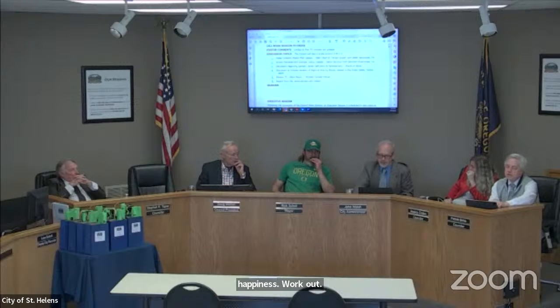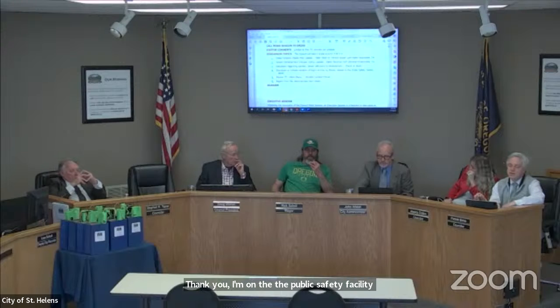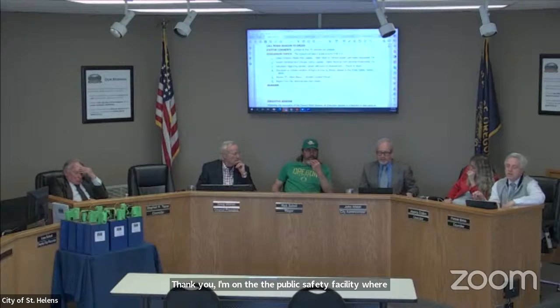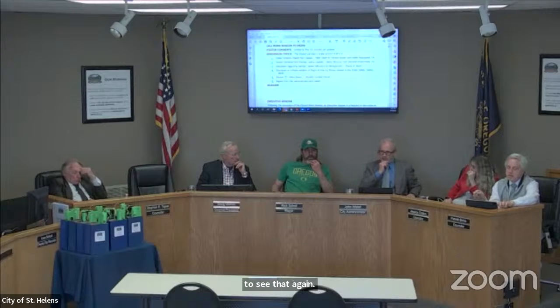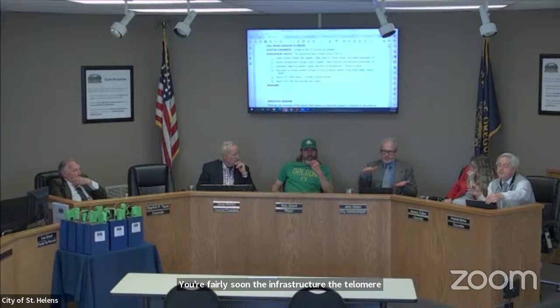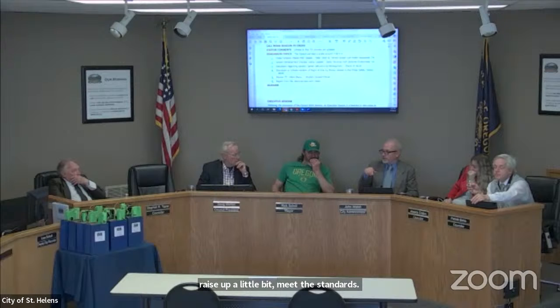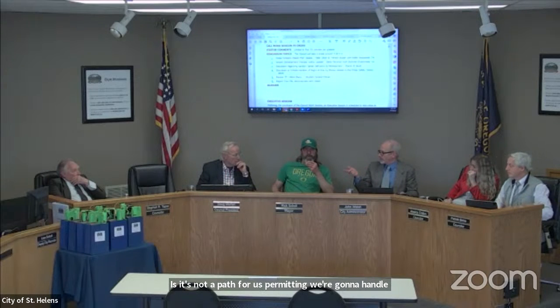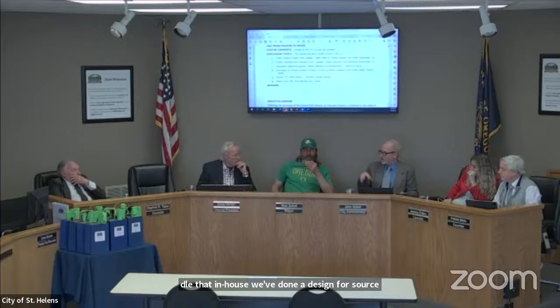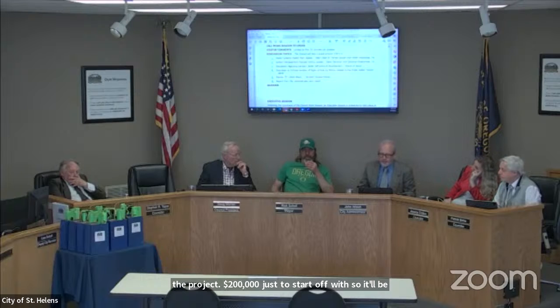I'm on the public safety facility. We're moving. Lots of good progress on the design there. You're gonna see that again here fairly soon. The infrastructure, the fill and grade portion of that, the site that we need to raise up a little bit to meet the standards, is on a path towards permitting. We're gonna handle that in-house. We've done a design for the source of material on the site. We're gonna take some of the material on site, crush it on site, and save the project $200,000 just to start off with. So that'll be self-performed, and hopefully we'll keep along with the project timeline real nicely here.